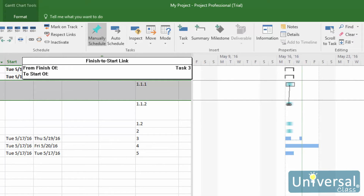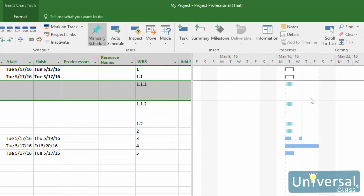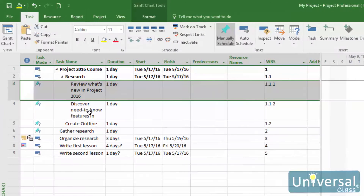When you do, you will see a line drawn and a chain link symbol. You'll also see a little box notifying you of the finish-to-start link that you've created. Let go of your mouse button, and you should see a new column added. If this hasn't happened, it could be because your tasks are manually scheduled. So we're going to set all of our tasks to auto-schedule.